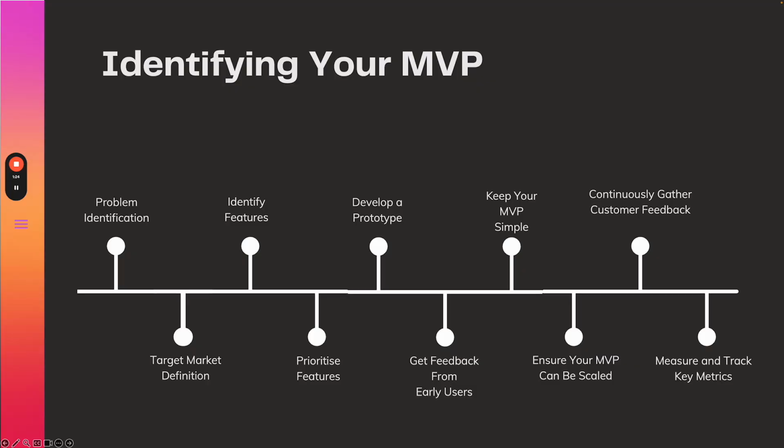Trying to do everything at once or trying to be everything to everyone will see your project end in failure. I really recommend identifying a minimum viable product, or an MVP as it's referred to. And an MVP is a version of your product with just enough features to be usable by early customers who can then provide feedback for future development. A focus on releasing an MVP means that developers will potentially avoid lengthy and unnecessary work.